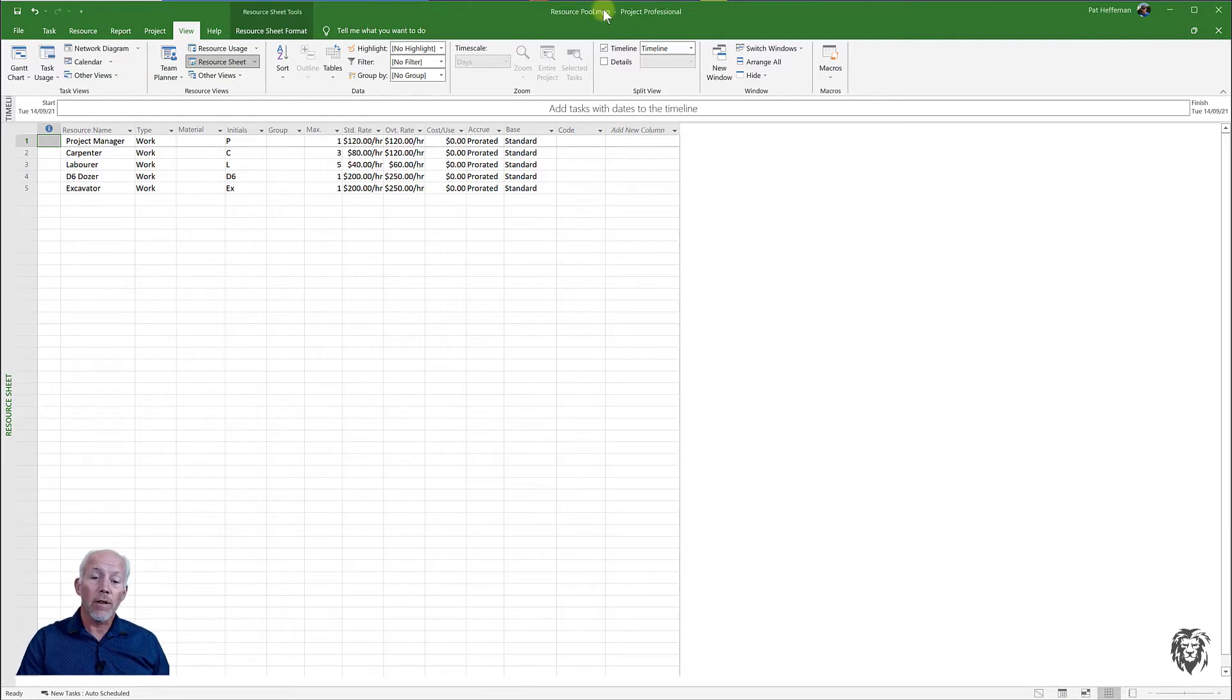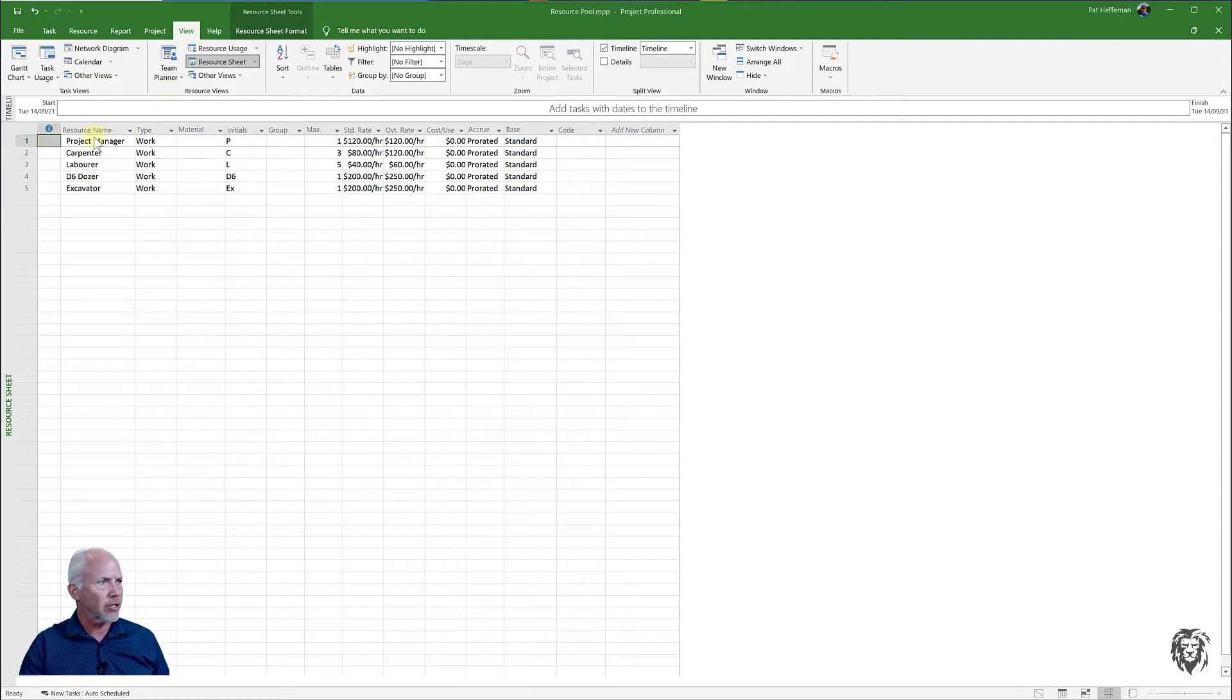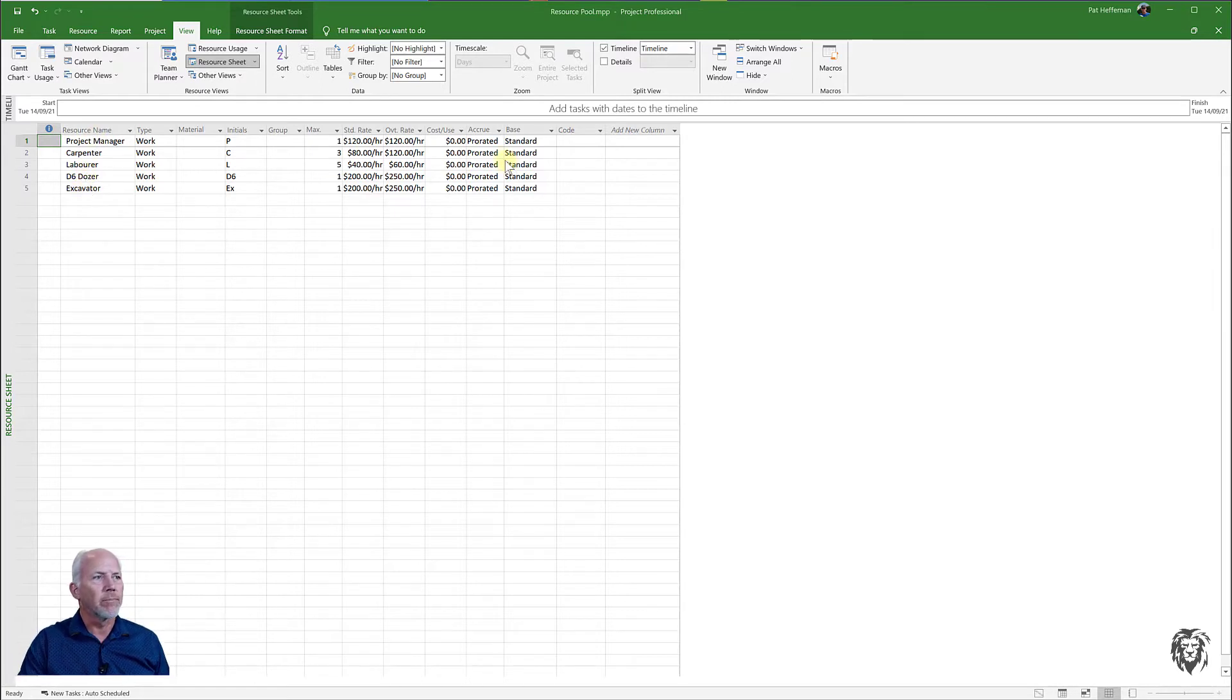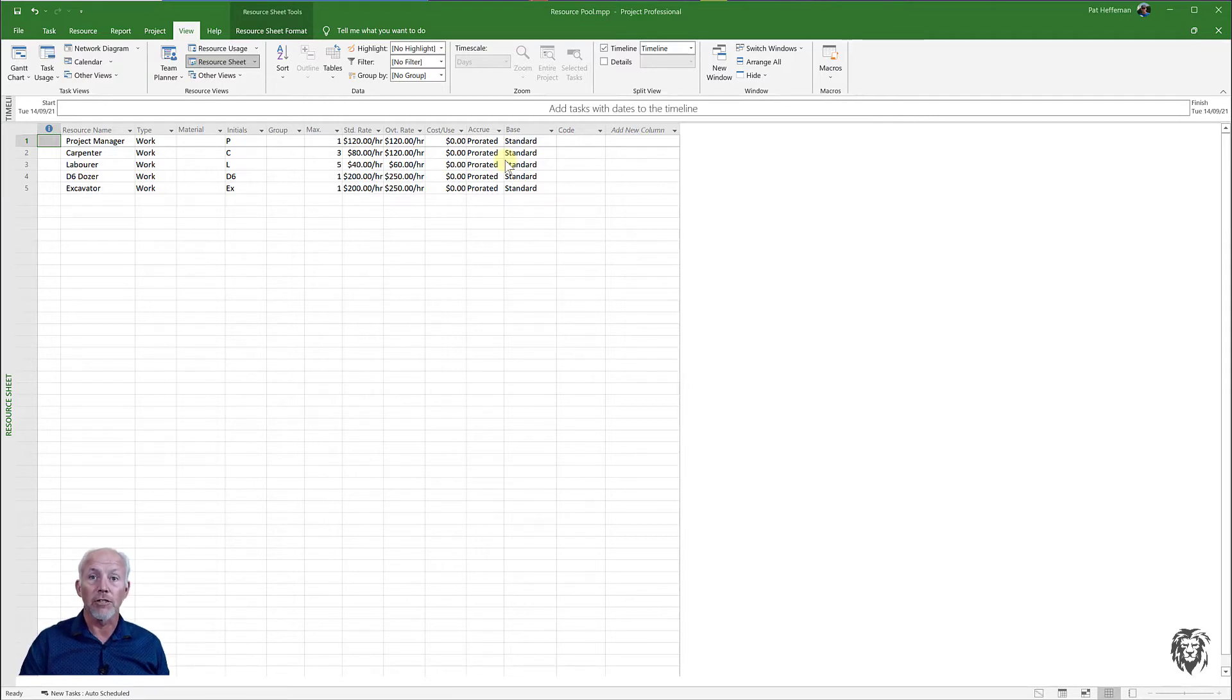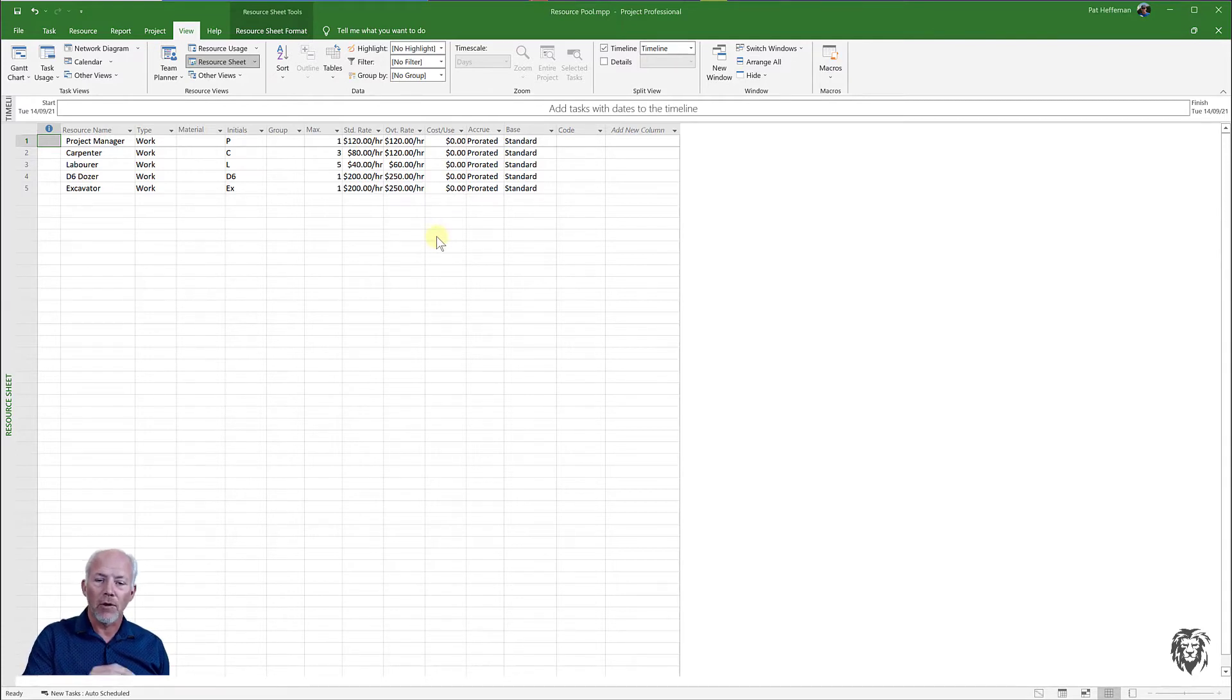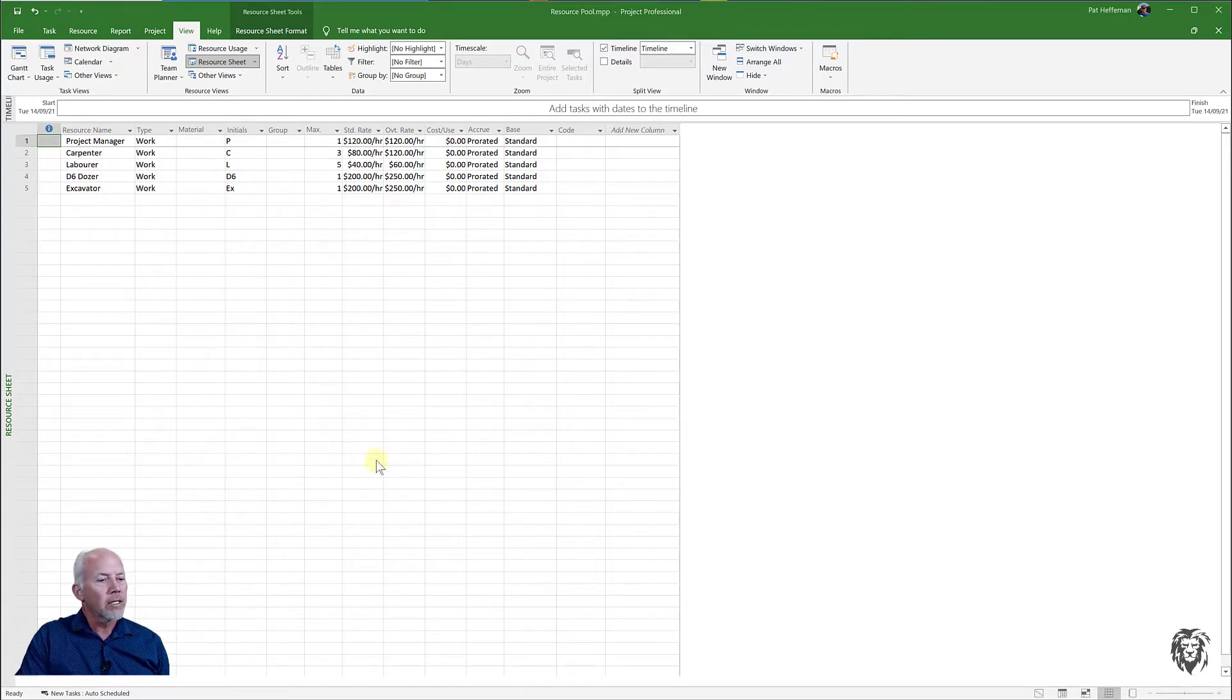The only thing in this project file is the resource sheet. I've added resources for the project manager, some carpenters, laborers and some equipment - a D6 bulldozer and an excavator. I filled it out for standard rates and all that information that I would want to have shared for the various projects. There is nothing else in the project file other than the resources.